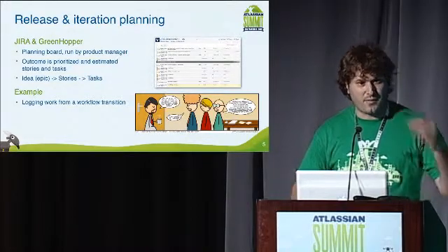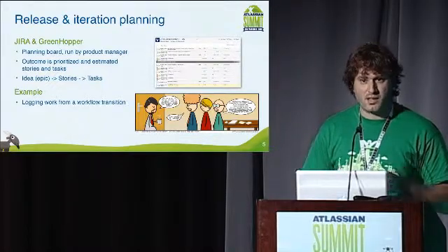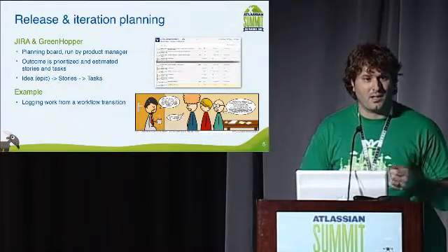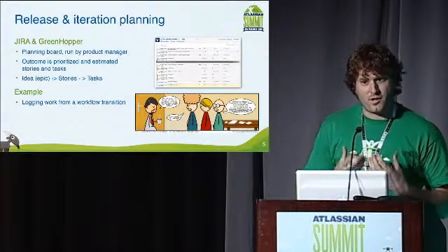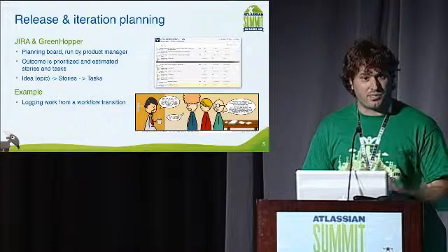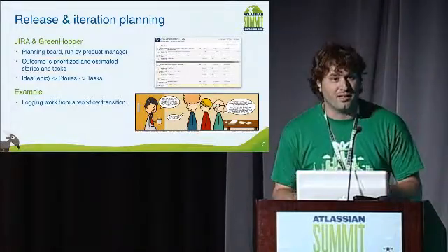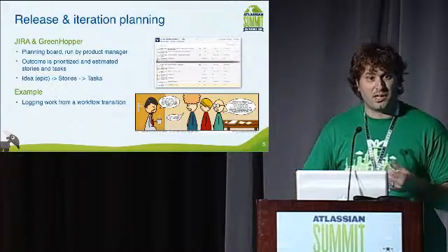And that goes right onto the top of our backlog into the first iteration, and maybe it's a time-boxed thing where we have 3 days and we plan out, we're going to just attack this thing and try and figure out enough information so that we can all come back together again and then plan out more specific tasks that'll actually ride us all the way to the end and the completion of being able to plan out that feature.